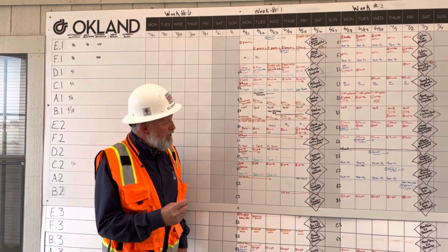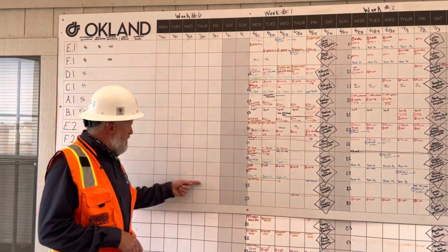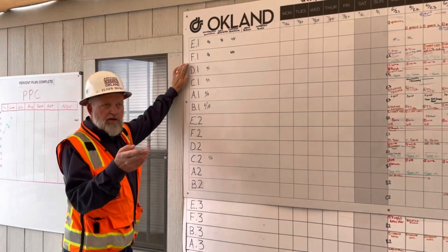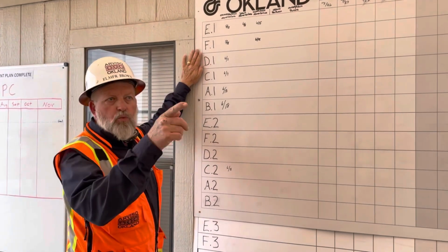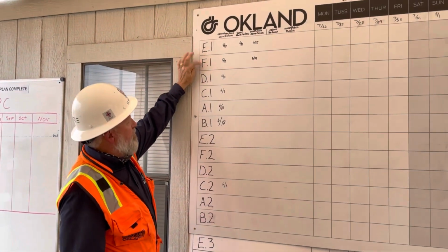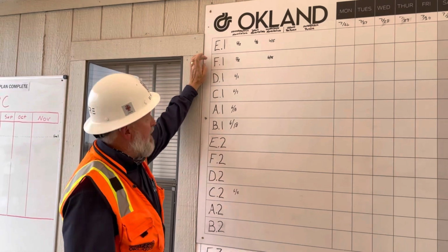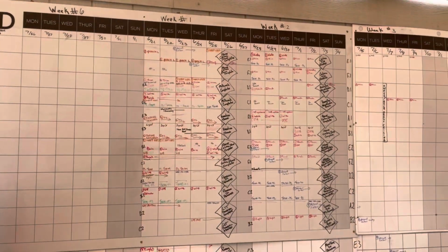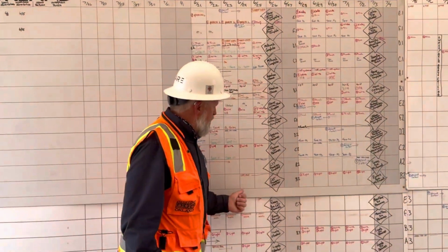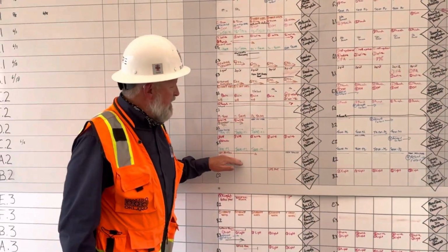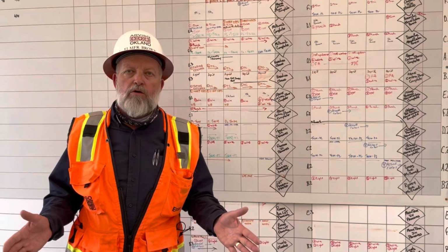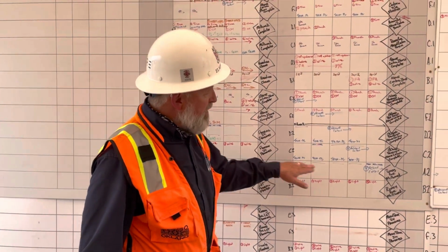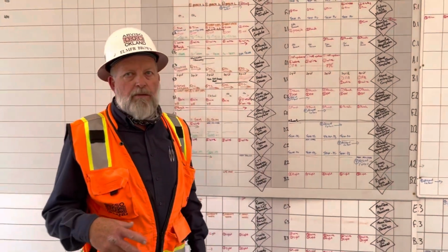One thing I probably should have mentioned was each one of these fly zones has been divided up into an area of the building that correlates with our Takt plan. So F1 on the Takt plan is area F1 here, and it carries all the way through week by week. We try to encourage people not to have activities written up here that take longer than 1 week or 2 weeks at the most. If they do, we ask them to break it up into another goal.